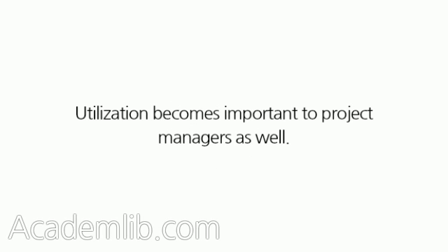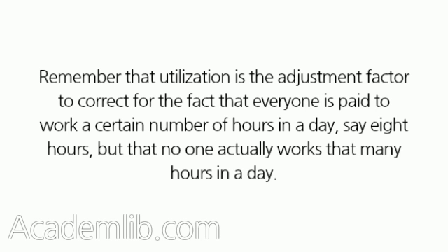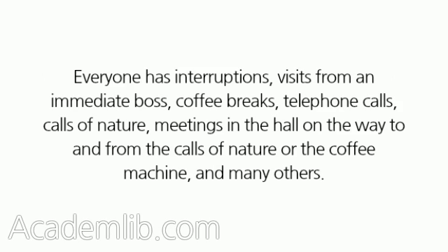Utilization becomes important to project managers as well. Remember that utilization is the adjustment factor to correct for the fact that everyone is paid to work a certain number of hours in a day, say 8 hours, but that no one actually works that many hours in a day. Everyone has interruptions, visits from an immediate boss, coffee breaks, telephone calls, calls of nature, meetings in the hall on the way to and from the calls of nature or the coffee machine, and many others.